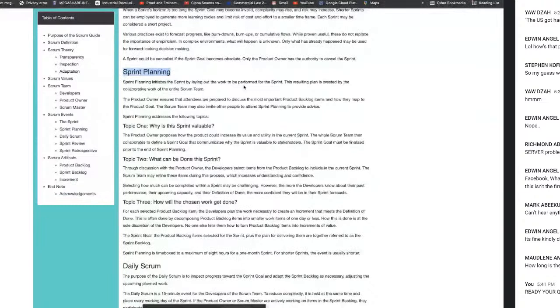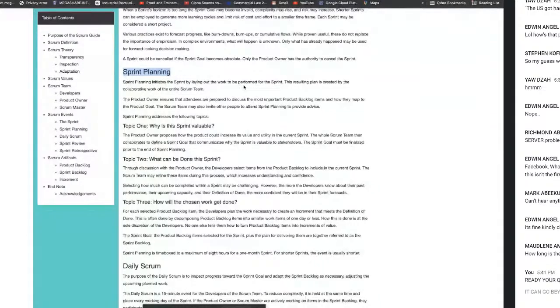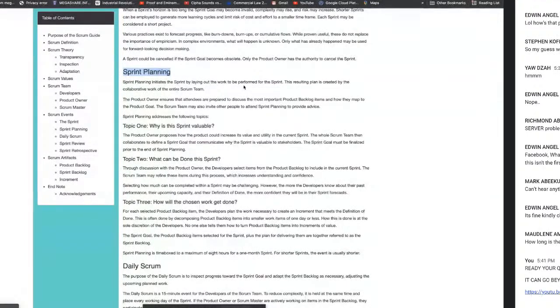That is to say that whilst the sprint is ongoing, the product owner and Scrum Master might be engaging to prepare the backlog for the next sprint. That is why we said that it's not like the sprint happens and then another sprint, you now prepare your requirements and you continue. The sprint is continuous, and that therefore must be consistent with the development efforts and the requirements.